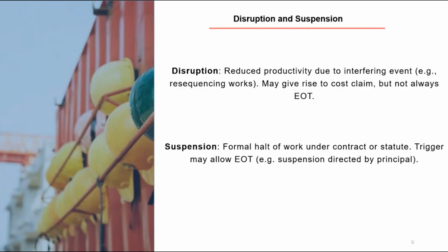So that is also an issue that's relevant when you're considering EOTs. The other aspect is when work is suspended, and generally there is a provision in most reasonable contracts that the contractor would get his costs of demobilisation and remobilisation and some agreed amount or reasonable amount in the period of the suspension.